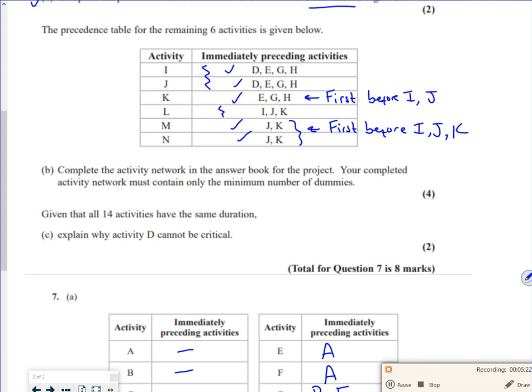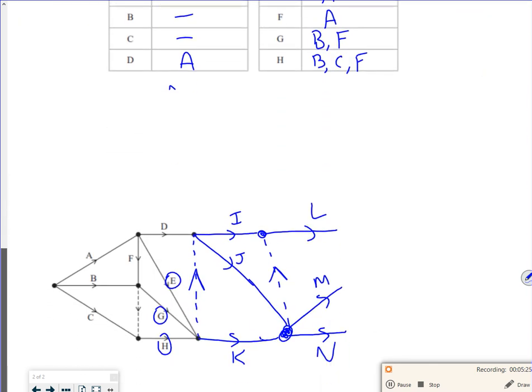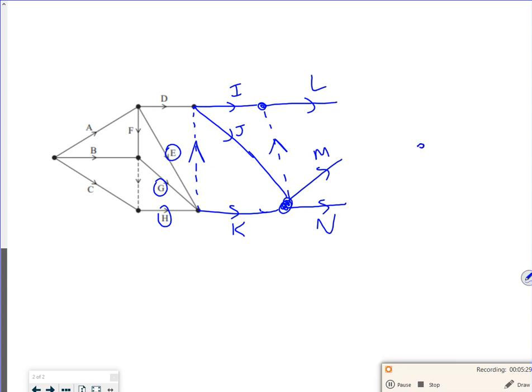That's everything then, isn't it? That's covered absolutely everything, which is impressive. So only N and L now have to be attached together. So if I put like a sync node, I can stick L in there. Now I've got a bit of an issue here now, because I've got two starting from the same point that need to finish at the same point. So because of that, I need to introduce a dummy. So I'm going to stick a dummy in here. So if I directly connect M, I can put a dummy in there. Now you could put the dummy on N and have it directly connected on M. Some people put the dummy at the start. But the important thing is here, that it's started and finished at the same point. So that's it. I've got a dummy.